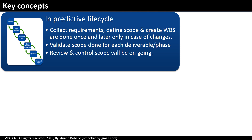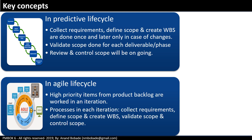Scoping is different in agile projects. Initially, a product vision is developed, and the product backlog — a list of high-level product requirements — is developed based on that vision. High-priority items from the product backlog are then added to an iteration, sometimes called a sprint. In each iteration, the processes include: collect requirements, define scope and create WBS, validate scope, and control scope. Remember, as per PMI, scope management processes are followed in both approaches; however, how they are applied is different.